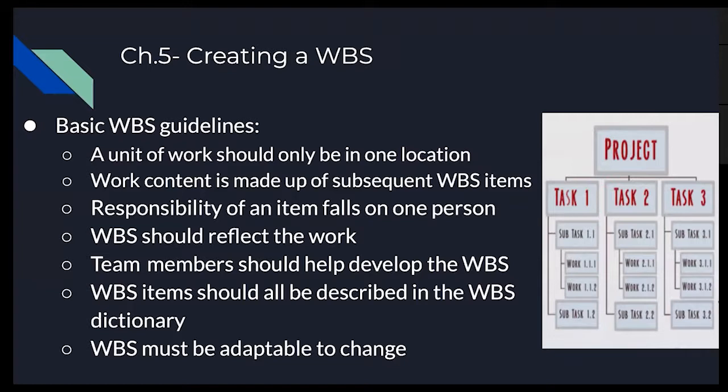Going on from that, with the work breakdown structure, pretty simple. It should reflect the work to come. As well, the team members should help develop the work breakdown structure. It's the same principle of you executed it, you should help plan it, you planned it, you should help execute it. It's all about establishing coordination. And again, the work breakdown structure should be described in the work breakdown structure dictionary. Same purpose, the terms need to be defined out. And again, the whole principle of being adaptable to change, that's what the work breakdown structure is about too.